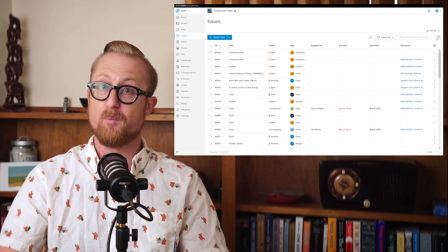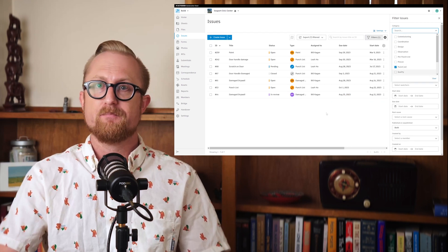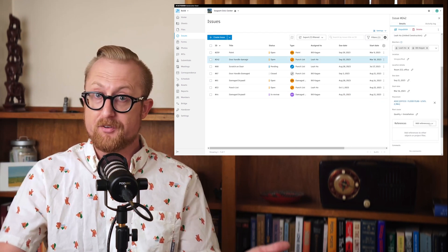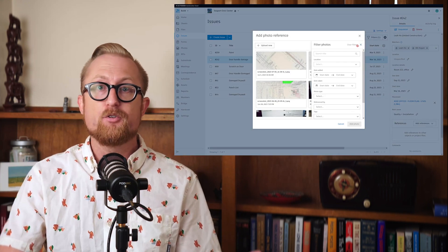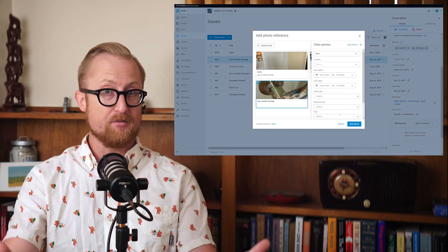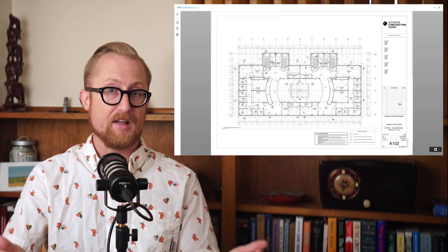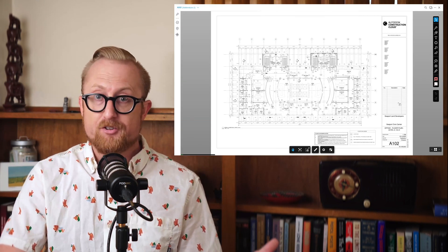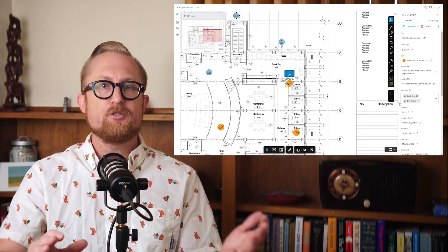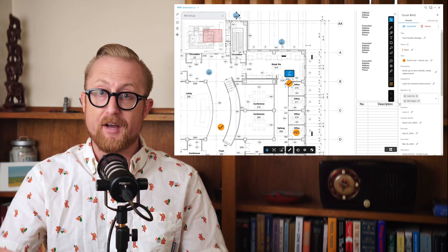Now, I doubt this news will surprise you, but Autodesk Build can do exactly that. The Issues tool lets you filter directly to your punch list items or any custom issue type you capture. Issues can be attached as references to things like checklist forms, photos, RFIs, and assets. You can even add location data, the root cause of problems, and pin an issue to a sheet or model to visually communicate where the item is on site.